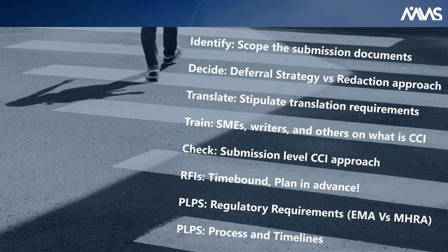prior to the application. 1, identify the scope of your submission documents. Decide on deferral versus redaction approach for those eligible documents. Translation, what will be the requirements for your documents, and build in the necessary time needed for this part. Train everyone who will work on the submission about CTIS requirements and their expectations, including CCI training for SMEs, and even the need for lean writing for your medical writing team.